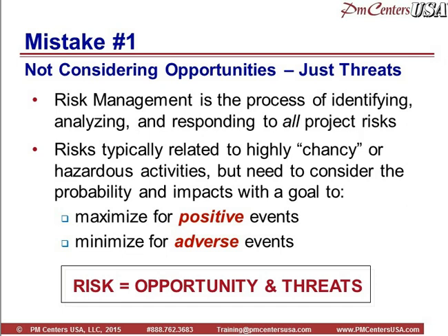I see this happen all the time. Organizations look at risk management as being bad things that can happen on a project. And it's unfortunate because if you look at the definition of risk, go to dictionary.com, and it talks about chancy, hazardous events. So the definition talks about bad things. But in reality, risk management is identifying, analyzing, responding to all risk. And the point is, risk can be either positive or negative, adverse or positive. So risk management is all about the opportunities and the threats on your project.